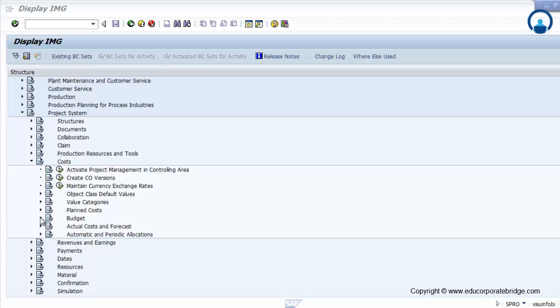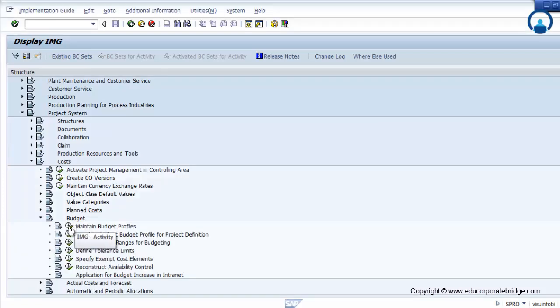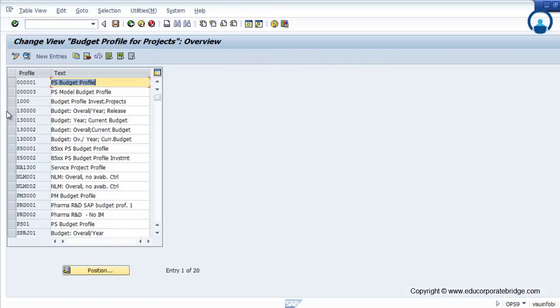The budget is only managed on the project and WBS level, and not on the network activity. So to maintain the budget, you have to maintain the budget profile. Let's check the budget profile.